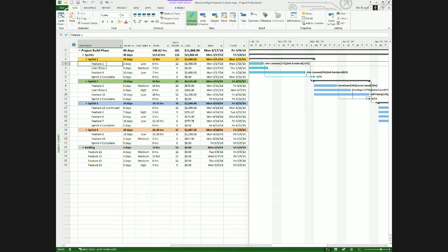So they say small, medium, large, extra large. And so it helps people get their arms and legs around what you can tackle within a sprint. And the idea is that as you begin to learn in your implementation, it isn't just tribal knowledge, but you can actually start forecasting the success based upon the complexity factor that you can work with.